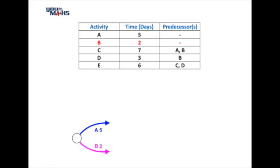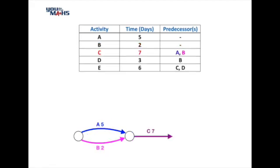The next task to look at is activity C. That has two predecessors, A and B, so logically the lines from A and B will join one node and C will come off that, indicating that activity C cannot start until both activity A and B are done.